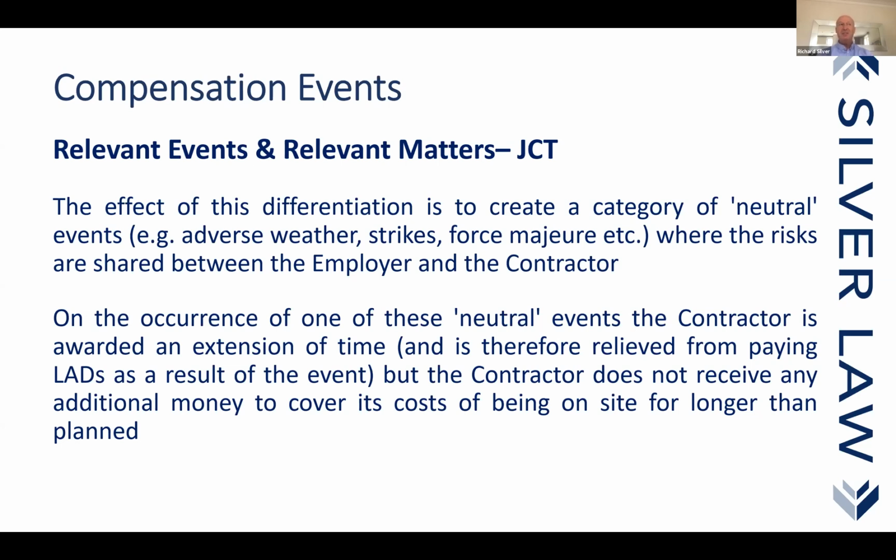As far as I'm concerned, if the employer issues me a relevant event for exceptionally adverse weather conditions, but I think that he's covering himself because he doesn't want to issue for variations, being honest, I'm not bothered, because the reason the relevant event is issued, an extension of time, is to get rid of the damages for that period of time. I've been awarded 10 weeks extension of time. You now cannot claim 10 weeks liquidated damages. But I can still recover the relevant matter, loss and expense, because provided I can show that but for the event, I would have not incurred this cost, I can recover it.